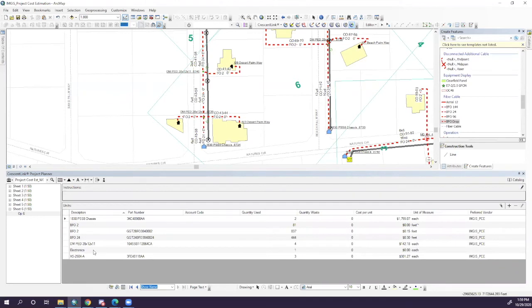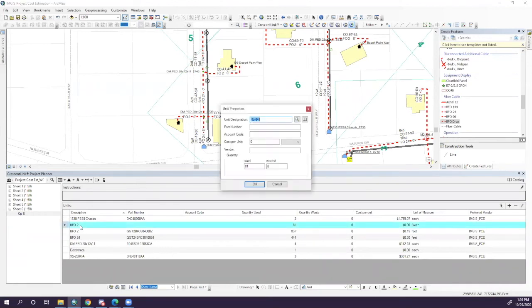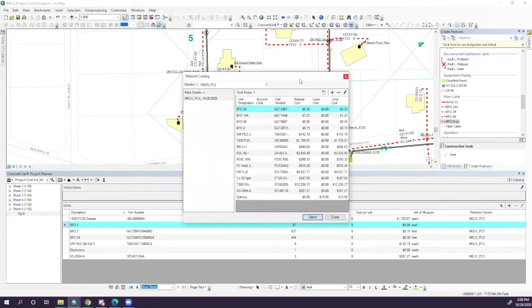All right, so as you can see, I haven't tied these in yet, because I just used, like I said, my very generic feature templates. But what I can do is go here, and I have added a rate sheet. I basically imported a rate sheet, just as a CSV file, into CrescentLink to be used for instances like this, okay? So I can bring up this rate sheet.